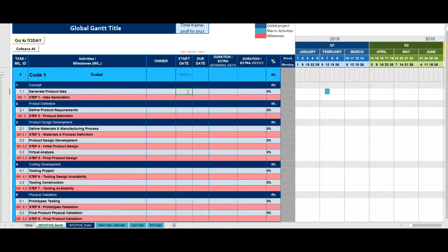At this point, in these columns, the duration in days and weeks appears, while the numbers that appear for the milestone represent the extra days and weeks that we have to achieve said milestone, according to our activity end. It's an indication of how safe we are, considering that our activity could take more time than predicted. As last input, we choose the percentage of completion of the activity, which according to common project management strategies can only be 0, 50 or 100%. Basically, to be realistic, we just indicate if the activity has not started, it's in progress, or it's just finished.